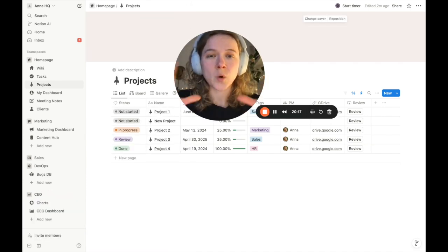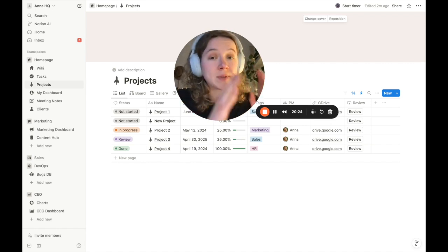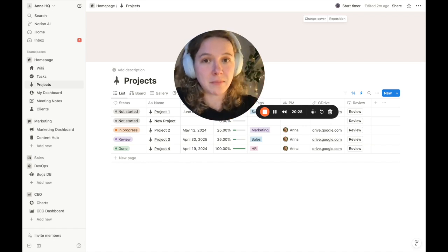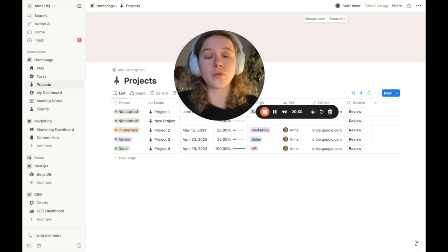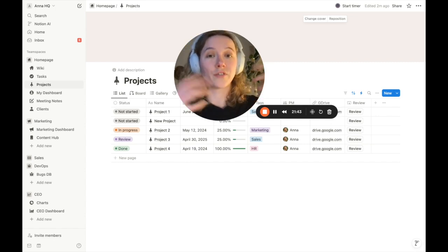So as a summary, we can use automations inside Notion directly. So whenever we create a new project or a new client, a specific amount of tasks are automatically created and assigned to a specific team member of ours. So we don't need to do this manually every single time that we create a new project. And this is just a tiny and simple example of how to use automations inside Notion. Because, of course, whenever we're working with workflows that are longer and have many stages, we can set as many automations as we want to.